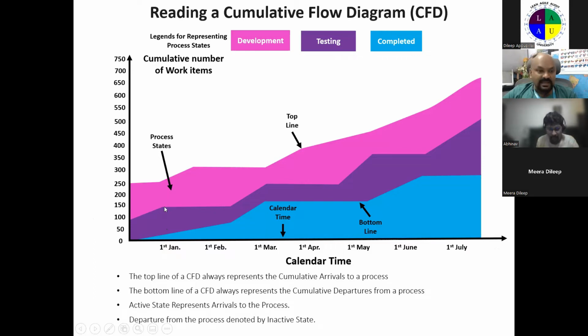And when you analyze a CFD, there's a thumb rule. In any CFD, the line never goes down, because it is cumulative. So the line will either be steady or go up. When you prepare a CFD, if the line is going down, that means the data needs to be corrected, and this team or assignment is using wrong data. That is point number one.